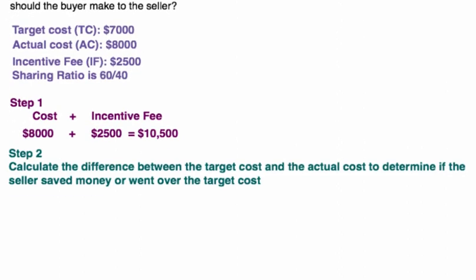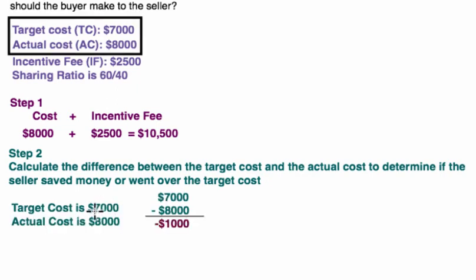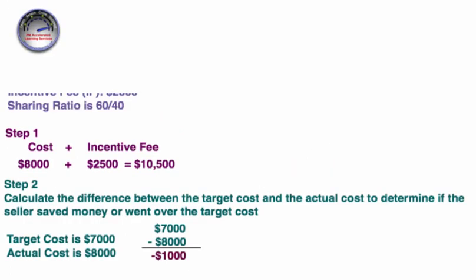Step number two: calculate the difference between the target cost and the actual cost to determine if the seller saved money or went over the target cost. The target cost is $7,000 and the actual cost is $8,000. $7,000 minus $8,000 is negative $1,000, so we have an overrun of $1,000. Just two easy steps to go.